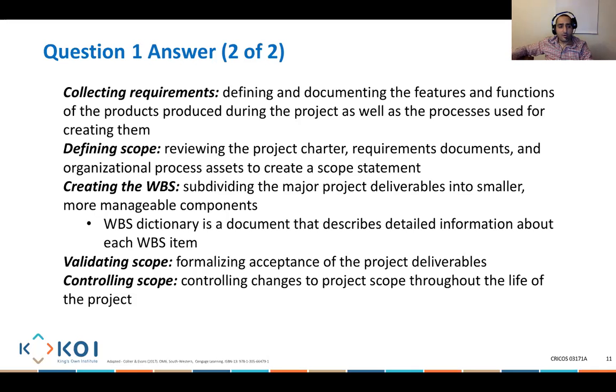What is actually involved is about really going and trying to ask yourself all of these steps. So fix a toilet. What does that mean? Well, let me go and buy all the materials, buy all the resources. Let me go and get a quote from plumbers. Let me go and employ a plumber. Let me go and ensure they're going to start doing the plumbing work. Let me go and inspect it after. Let me go and check it works fine. And then finally you say toilet completed.